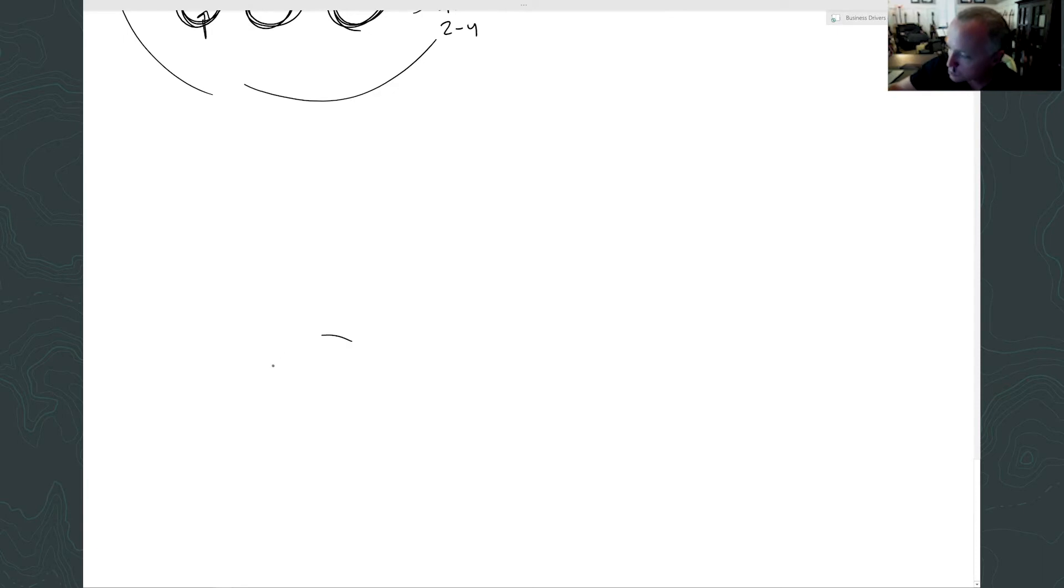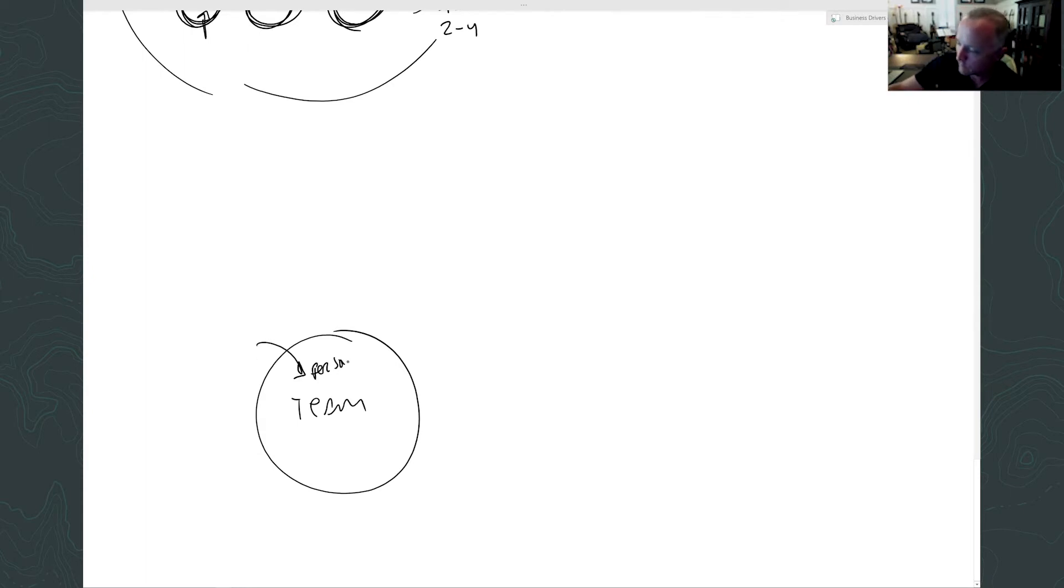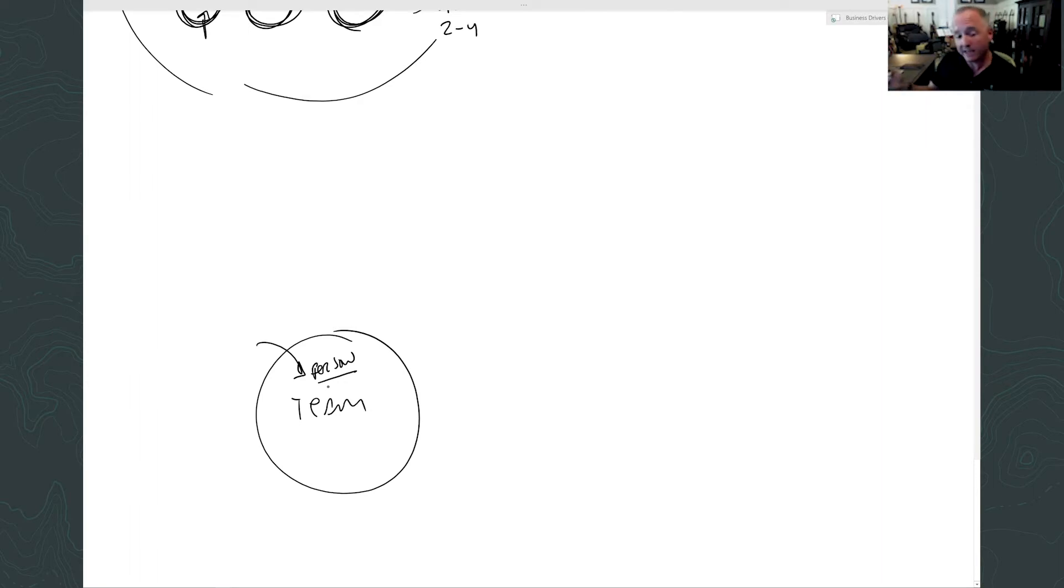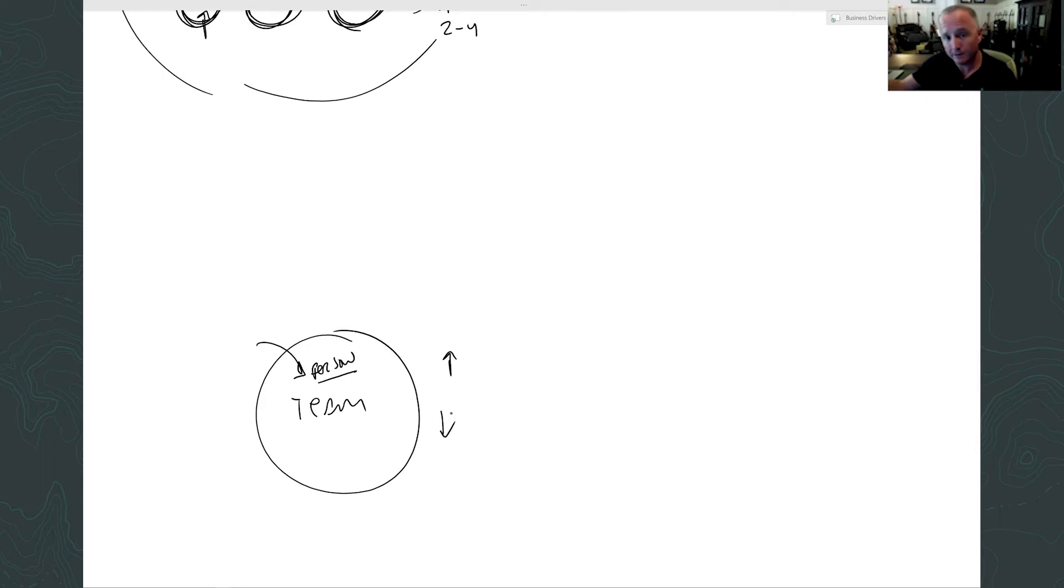So you have a team, right? I can put a person on a team and leave them there for a bit and measure. Maybe velocity goes up, sometimes velocity goes down when you add another person to the team. There's no linear correlation necessary between human beings and the throughput of a team.